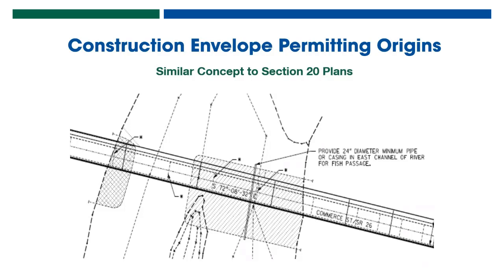It gets complicated when you try and talk about design bid build and design build at the same time, because that first let on a design build could come very, very early, does come very early, because design is continuing post-let. So my point in all of this is to say that design build encountered a need early on in GDOT's, as GDOT grew its P3 and design build programs. What was encountered was this issue of, well, we're getting to 30% costing plans, and that's what we've got at let, but how are we going to obtain a permit if we were to obtain that before let?